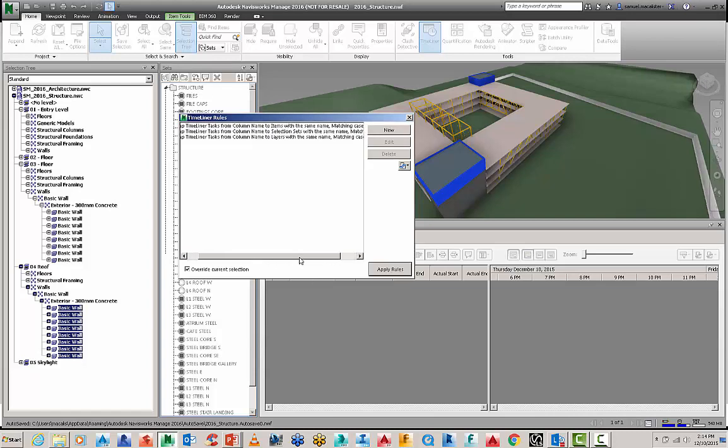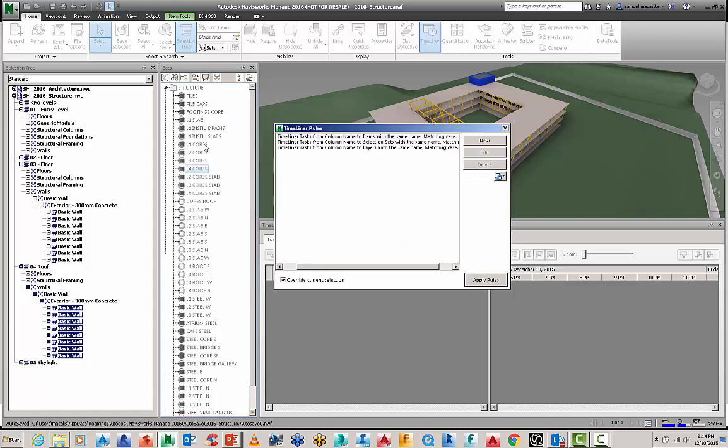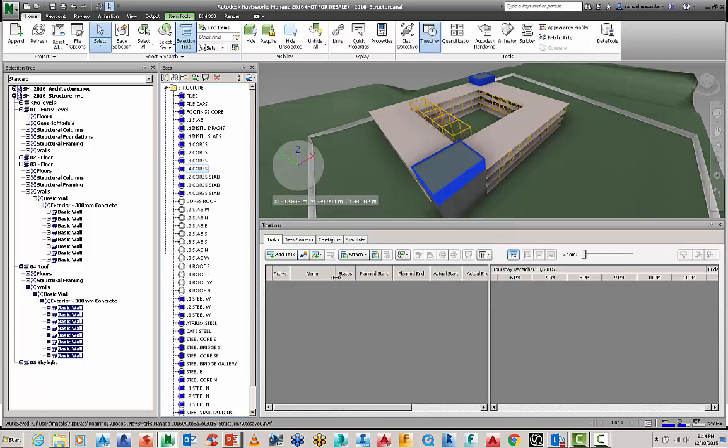So this is why it's important to get those two naming conventions, one within your sets and your construction program matching, and then you'll be able to benefit from using this tool.